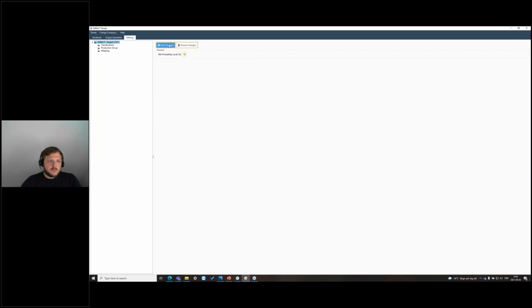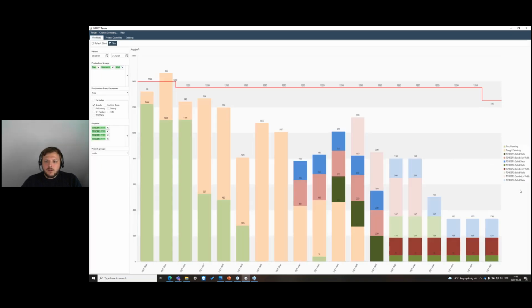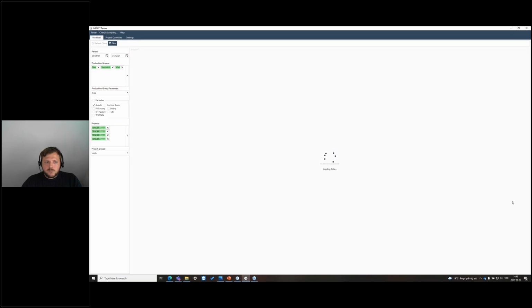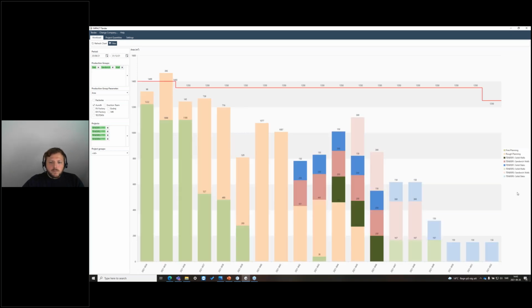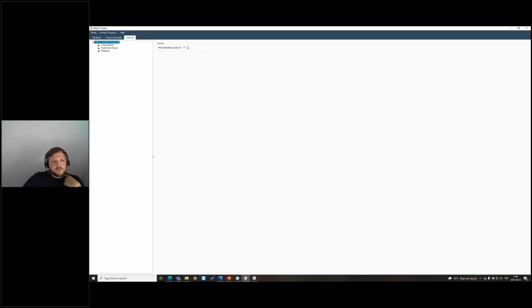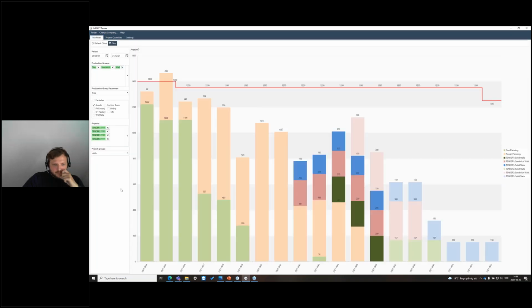So if you refresh the graph now, you can filter out those backlog quantities. The probability is less than 70%, so it takes up to 70%. In this case, my tender 2 project had a probability of 60%, so now it's not visible anymore, because we have raised the probability. If you have a backlog that you don't want to see, or you want to filter out small projects, or things that you are not very sure are coming, you can put them at 30%, 40%, 50%, and always look at the graph with more than 60 or 70%.